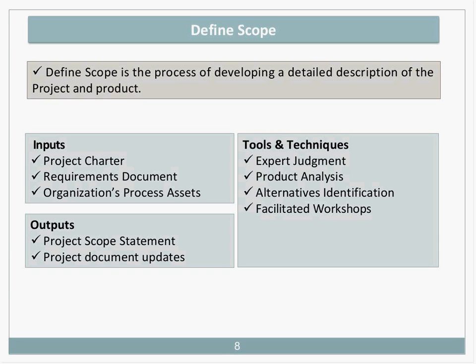Before I go further, I see there's a question asking for an example of a traceability matrix. Not the example, but I can explain what a traceability matrix is. It's a matrix in which you make certain that the business needs are included in your functional requirements, what is in the functional requirements is in your technical requirements or technical specifications, what is in the technical specifications is in your design, what is in the design is in your product, and what is in the product will be tested. So from one to the other down the line, there will be nothing more and nothing less. Because if there's more, then you're doing work that's not required by the business need for the project, and if you leave something out, you're not following the total business need. That's the traceability matrix.